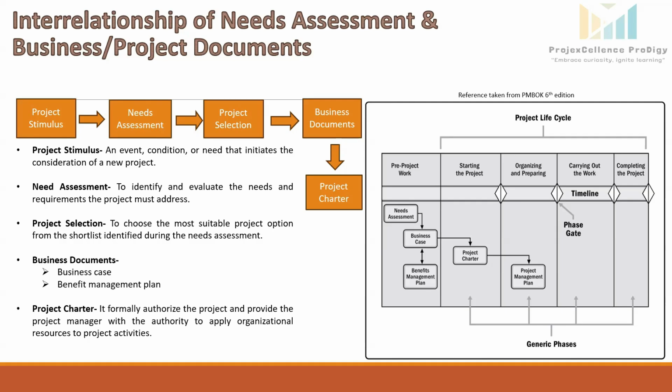To identify and evaluate the needs and requirements the project must address. So the company's business team under the business analyst will do the detailed assessment. They will find out the current and future power demand in that particular locality. They will evaluate different renewable sources such as solar power, wind power, hydro turbine, and what will be their impact on the environment and what would be the effective reduction in carbon emissions.